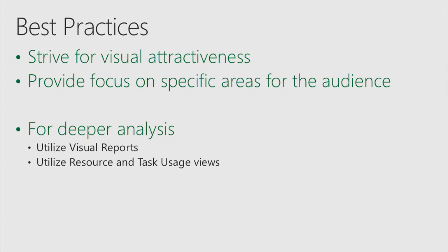We said that those kind of wall of data reports had disappeared and have been deprecated, and they have been. So what happens if I want a lot of assignment data, task usage data, etc.? Well, really, you've got two options there. The first is you can still utilize the task usage views or the resource usage views in Microsoft Project. So if you need who's doing what, when, over what time period and time scale, then take one of those views, customize it, and then have that as part of your standard report.